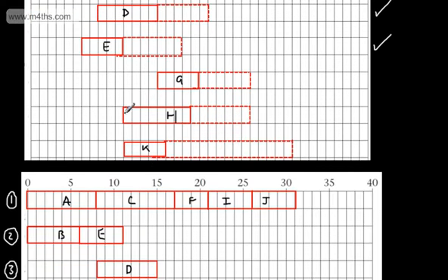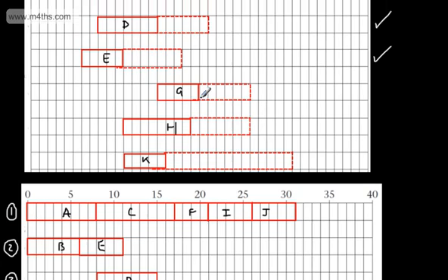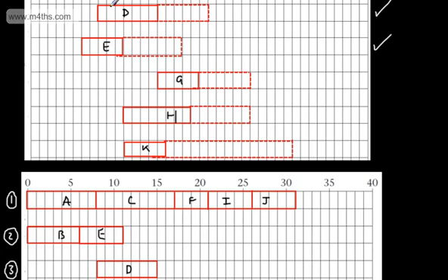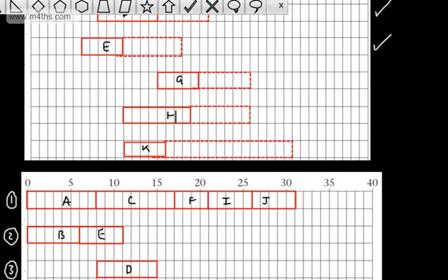When I introduced the topic, or at least the guidelines, we were told we allocate the one with the earliest late event time. Therefore, I'm going to give worker number 2 H. That isn't absolutely essential, and there are lots of different configurations, but in general, that's one guideline that's recommended. So what we're going to do then is say now H.